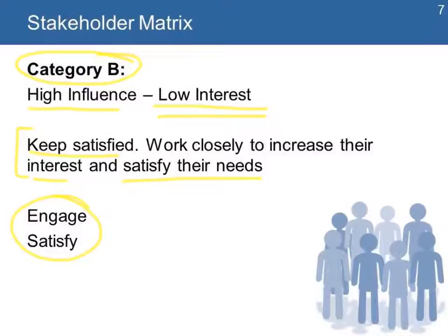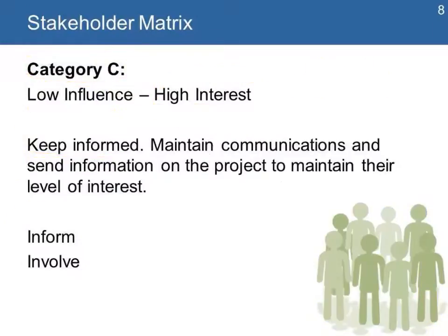The goal for the project manager in this group is to get them from low, at least, to try to get them into high interest. Why? Because of the level of influence and power they have. You don't want this group to have a negative interest because of the power they have.